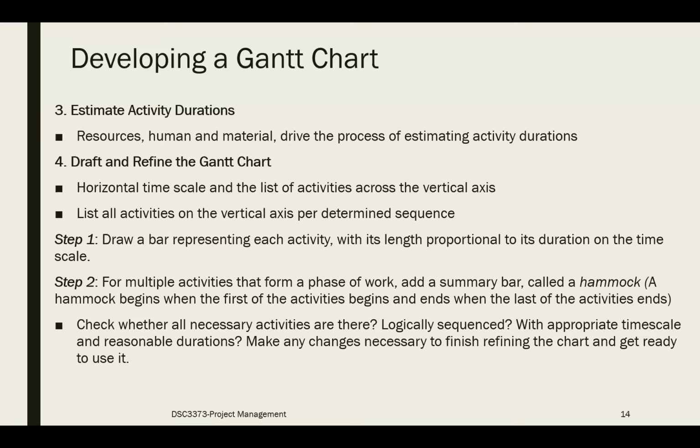If there are multiple activities that will form a phase of work, you can also add a summary bar, or what we call a hammock, right? This hammock will begin when the first activity begins and end when the last activity ends.